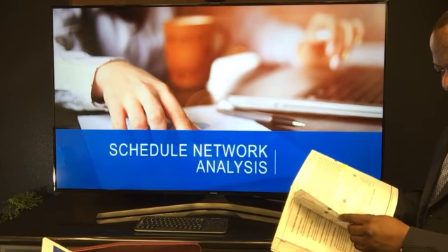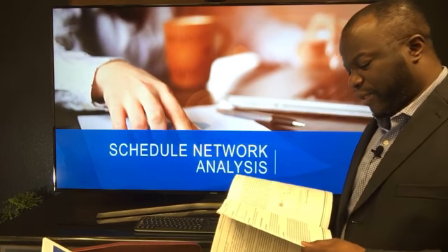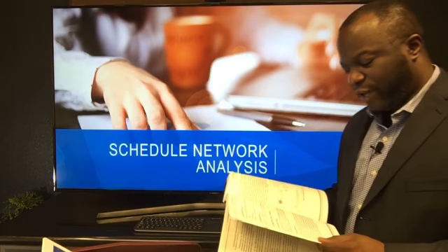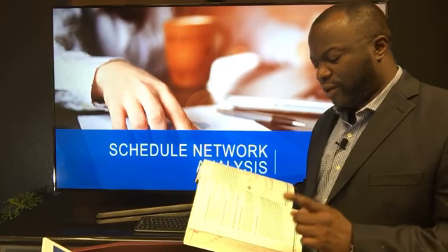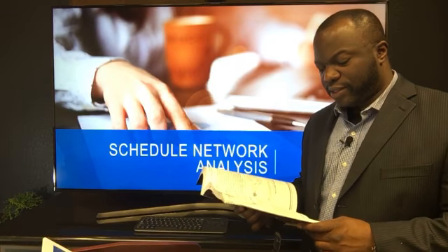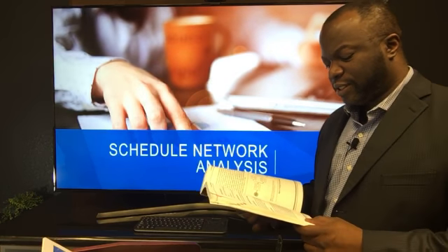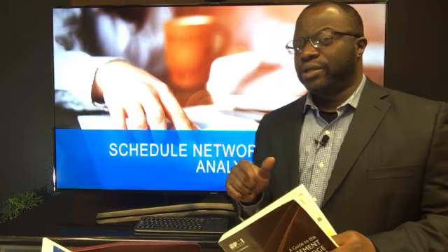Section 6.6, page 176. Schedule network analysis is a technique that generates the project schedule model. It employs various analytical techniques such as critical path method, critical chain method, what-if analysis, and resource optimization techniques, to calculate the early and late start and finish dates for the uncompleted portions of project activities. Some network paths may have points of path convergence or path divergence that can be identified and used in schedule compression analysis or other analysis. To cut the story short, folks, your forward pass, your backward pass in the context of the tasks at play, whether you are late, whether you are early, or how you see the project to be, that is really what they're talking about. But note, it's actually done in planning.